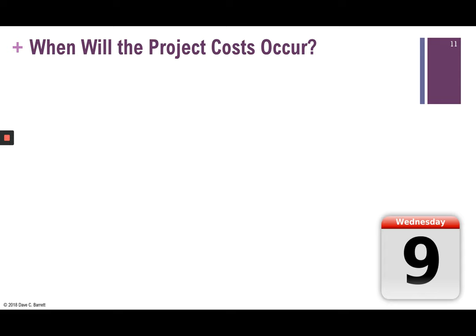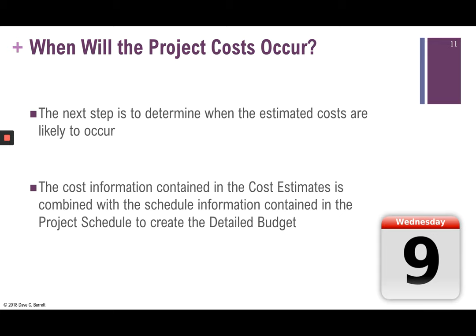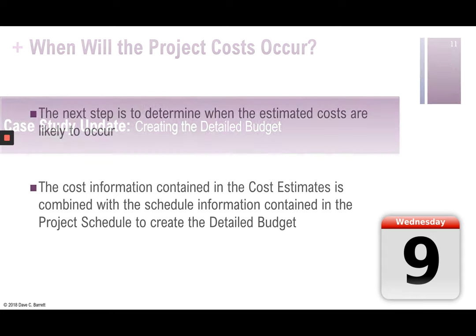Now on to step two: when will the project costs occur? We know we're on track to spend around $56,000, but when are those costs likely to occur? The cost information from the cost estimates is combined with the project schedule information. In order to create the detailed budget, you need the schedule in pretty good shape to determine when the project costs will occur.